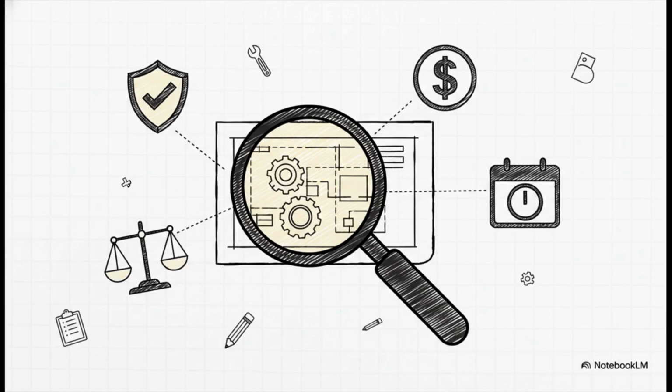I really want to zero in on step 2, impact analysis, because this is probably the most critical stage. I once saw a company try to make a simple material change to save just a few cents per unit, but they skipped the impact analysis. Turns out, the new material wasn't compatible with a downstream process, and it led to a massive $1 million product recall. That is why this step, where you get your cross-functional team together to evaluate the full impact on cost, risk, and inventory, is absolutely non-negotiable.